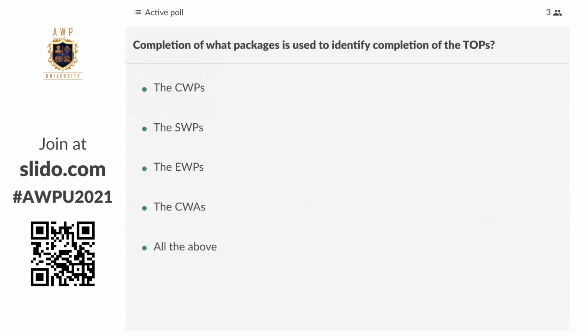And therefore, as we put together a turnover package, a CWP is a geographical reference, and there might be multiple CWPs required to identify the completion of a turnover package, and it's typically not identifying completion of a turnover package. Certain bits and pieces of CWPs need to be completed to complete those turnover packages, but that's not typically our type.